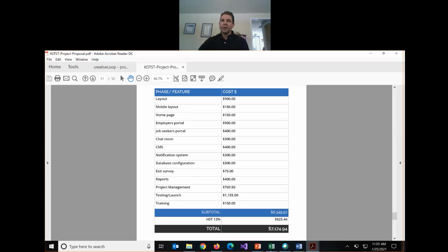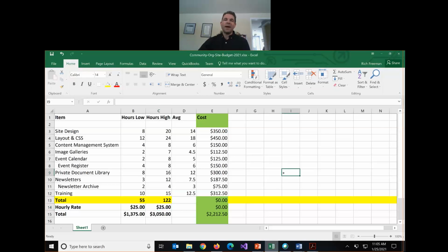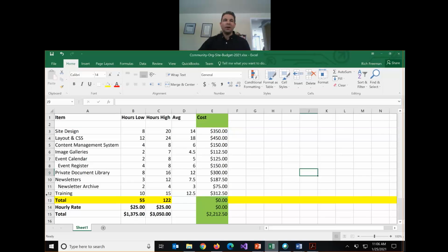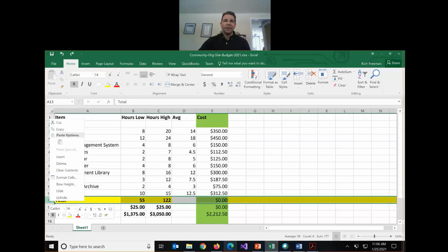That's right. Now I realize we're just past 11. There's 2 things missing here. There are 2 other things we should add. So what I would do for the budget is I would take these numbers, and Maggie, you asked about a buffer. I'd bump them up each a little bit. So if here my average is 14, I'd maybe charge 16 hours to give myself a bit of a buffer in each of these. So here are all the components, but there are 2 extra items we should add here. I'm going to show you these. I'll upload this to Blackboard and I will set you free for the day.